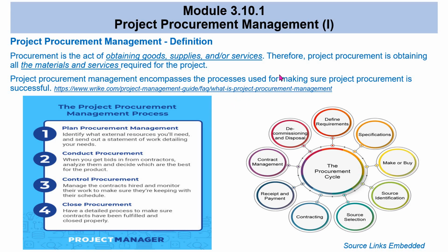So in other words, if you look at the procurement cycle, you would look at things like defining what you need in terms of requirements. What are the specifications? Do I need to buy them or make them myself? The materials or modules or parts that I need. If I need to buy them, how can I source them? Look for suppliers or manufacturers or designers. And I put a process in place to select which supplier, or maybe which site, I have to buy what I want from.